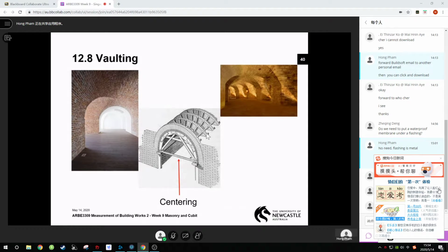Paving and steps, you say, oh, on slide 41 we are now, distance guys. So how come we've got paving? Isn't that in the paving section of the method? The brick paving that we measure under brickwork is where we've got a mortar joint between the brick pavers. It's not laid down on hardcore with no joint. It's got a mortar joint between it. Fairly rare. Saw a fair bit of it over in New Orleans. That's the most I've ever seen in any one place.